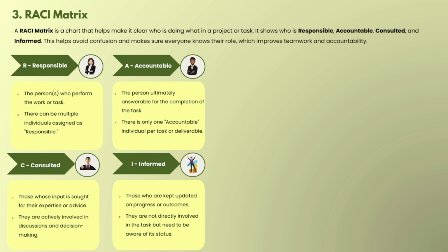Let us consider the same example, gathering the requirements. Here the informed person would be senior management. They are considered informed because they are not involved in any kind of decision, technical decisions or anything else. So here the project manager, product owner, technical team, and users are directly involved in the project, whereas senior management doesn't care about such a small thing, because there are lots of things going on under their umbrella. But as they are one of our stakeholders, it's our responsibility to inform them.